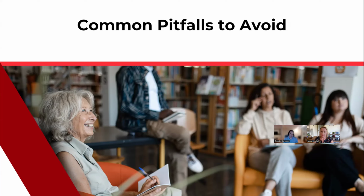One thing you could potentially do if it's a much more complicated project or a really large site is a lot of companies will provide paid discovery. So you can hire a company like ours for, it really depends, but a minimal amount of hours to really get into the back of your site and help you with some of that pre-planning process, so you could have a very clear scope defined for the project.